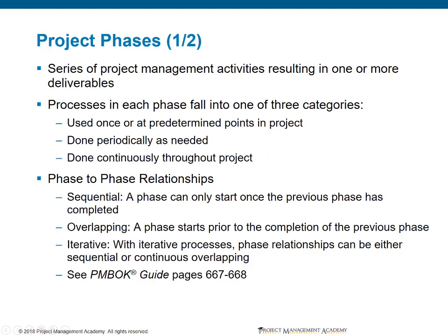Project phases. One of the ways that we may tailor a project is the selection of project phases. Again, because each project is unique, the project manager may need to tailor the way that the processes are applied. With the project lifecycle, we need to decide what is an appropriate project lifecycle. Should we have phases within a lifecycle? I like to describe a phase as being a project within a project, because with each phase, we will invoke all 5 process groups. We will go ahead and start it deliberately, and we will close it with the same formality that we would close a project.